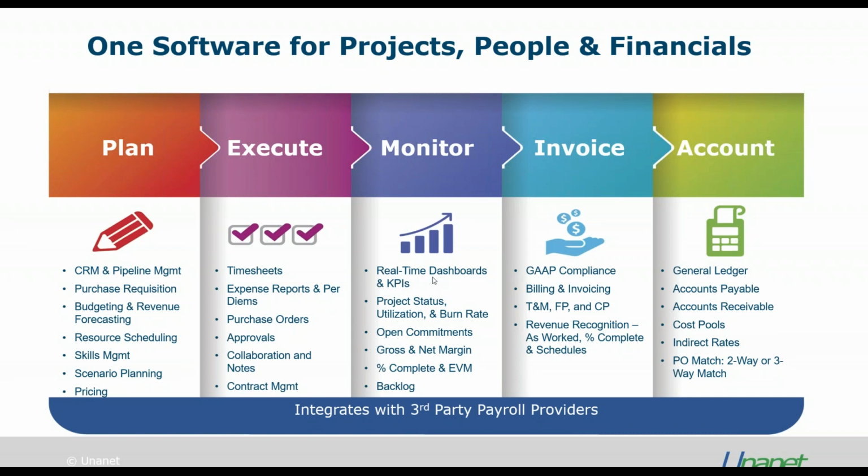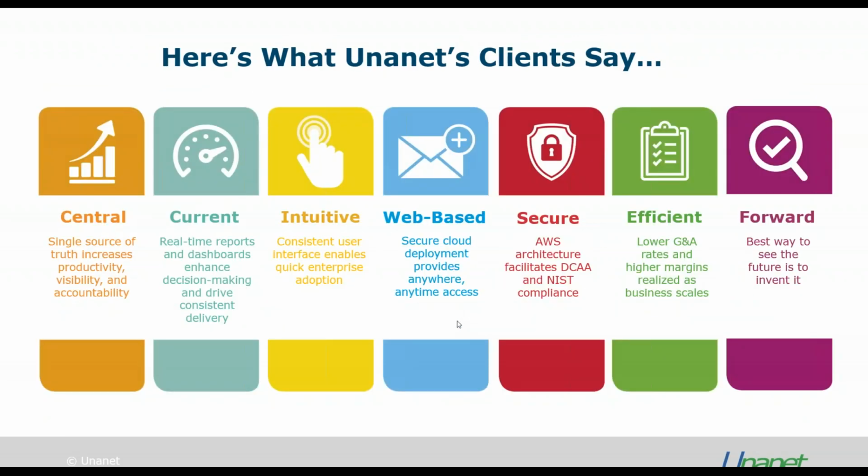For instance, project managers have real-time reports and real-time graphical dashboarding, showing them what is happening with their projects as it happens, as an hour is being entered in a timesheet, all the raw costs, all the burdens that are being added to that cost, and then totaled up along with the revenue, whether it's on a fixed price schedule, a time and materials contract, or a cost plus fixed fee, or other cost plus based contract. The system will show you in real time exactly what is happening, and I'll show you a little bit about how that works. But it's pretty critical for a total cost accounting environment where we need to be able to see what is happening, not just with our directs, but our indirects, preferably as they happen, as opposed to the typical scenario where we might only see those totals once the books have been closed for the month, maybe a week or two into the following month, and then finally get to see, oh my goodness, look what happened.